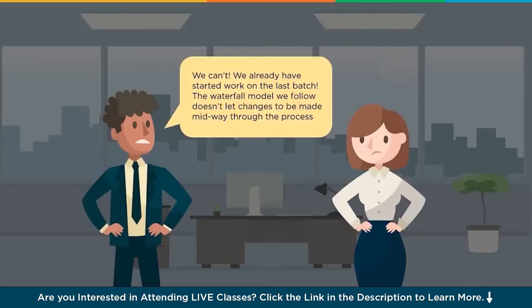The waterfall model we follow doesn't let changes be made midway through the process. The waterfall model does allow changes, but it doesn't allow us to make them quickly. Whenever there is a change, it requires a lot of effort - changes in documentation, changes in various implementations already executed - which is time-consuming and involves more cost. So how do we make required changes without specific additional effort that is acceptable to both the project organization and the customer?